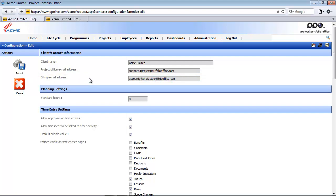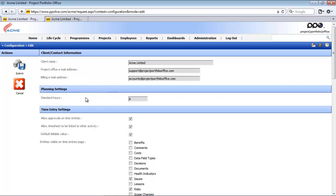The next section is the planning settings. PPO uses the number of standard hours in the resource planning calculations. If you want to find out more about the resource planning calculations feel free to watch the video on the resource allocation reporting. Also note that when adding the standard hours on your system config you can only add full hours. Do not add 7 and a half hours or 8 and a half hours. Either enter 7 hours or 8 hours.